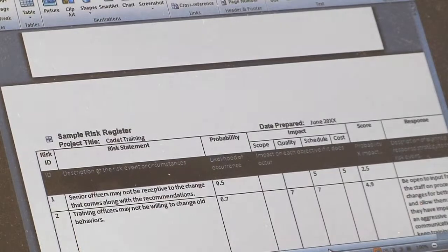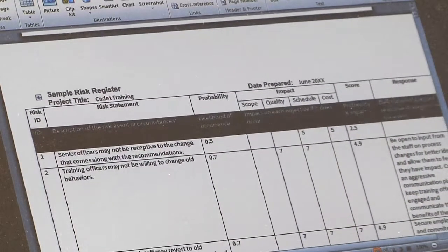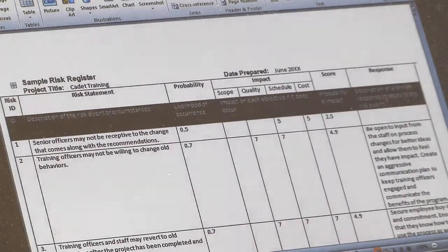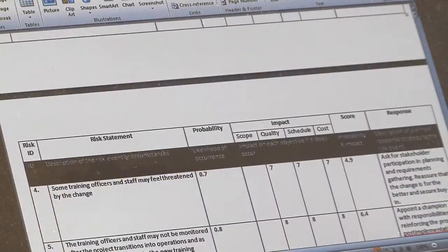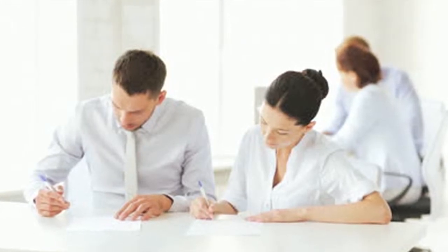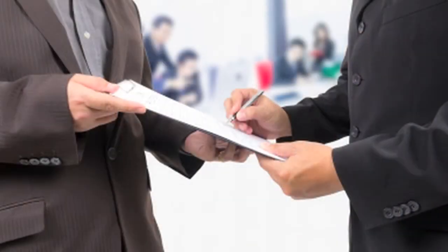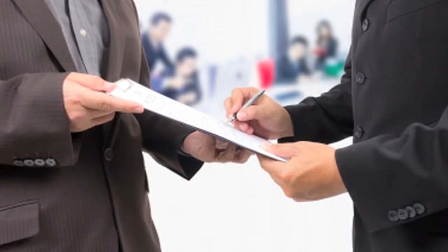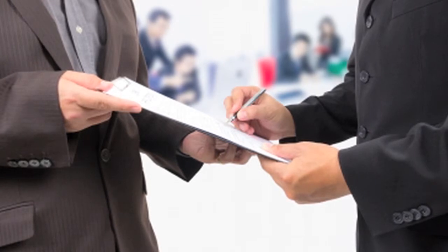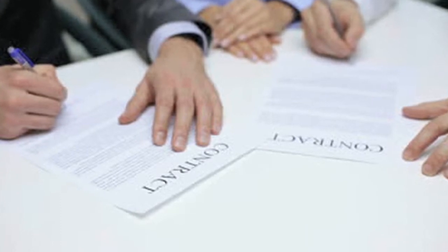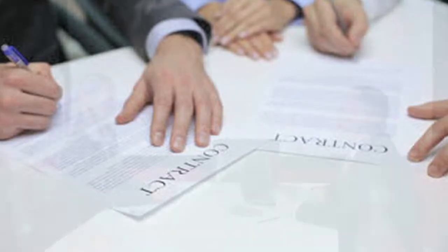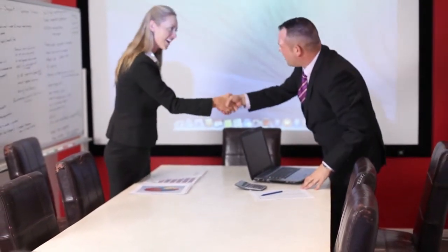The risk register, which includes risk-related information such as identified risks, risk owners, and risk responses, may also serve as a guide for determining the types of services or goods needed for procurement. Consider the risks involved with each make or buy decision. This information may impact the type of contract that is used with respect to mitigating risks or sometimes transferring risks to a seller. Risk-related contract decisions include agreements such as insurance, bonding services, and other items as appropriate that are prepared to specify each party's responsibility for specific risks as it relates to the project's procurement activity.